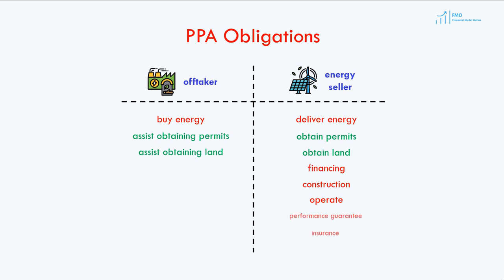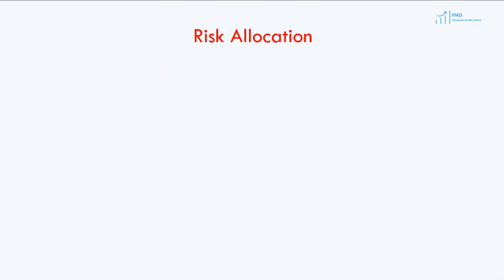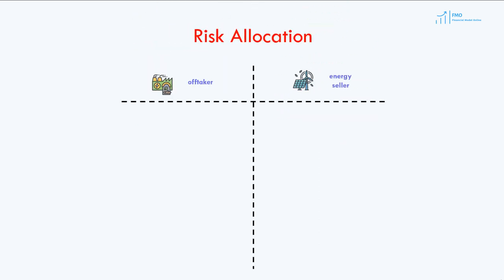The energy seller is obliged to maintain necessary performance guarantees and insurance policies during the construction and operation of the project. The obligations of the parties under the PPA create and allocate the project risks between the parties. For example, since it is the obligation of the off-taker to purchase the committed energy production during the term of the PPA, the off-taker takes the energy price and volume risks.